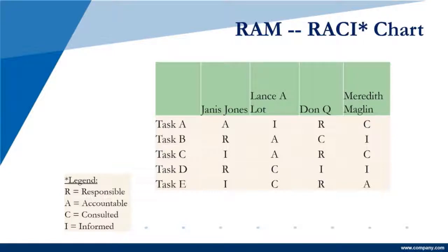Consulted means that they are asked about it. If I am hanging a picture, I may be the one driving the nail, but I'm going to consult with my wife so I put it in the right place. So consulted is important. And I might inform my daughter, because I'm hitting this nail on the wall she shares the other side of, and I don't want her scared if I bang on the wall. And that's just a brief example.